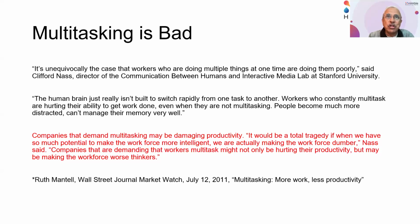But essentially, what it means is that you start to reduce focus on each and every task, and you produce poor quality outcomes, because you're context switching so much. And that is one of the fundamental principles that Kanban and Lean talk about, which is to reduce multitasking, reduce context switching, and improve the overall quality of work that your teams do. And of course, in a visual Kanban system, you can do that by implementing WIP limits that force teams to say, this is the amount of capacity that I have in a particular workflow stage, and I'm not going to take any more work till I have capacity to do that. And it's amazing how just by these basic principles, you can get dramatic improvements in your cycle time and flow efficiency, some of the terms that we will introduce you to in a bit.